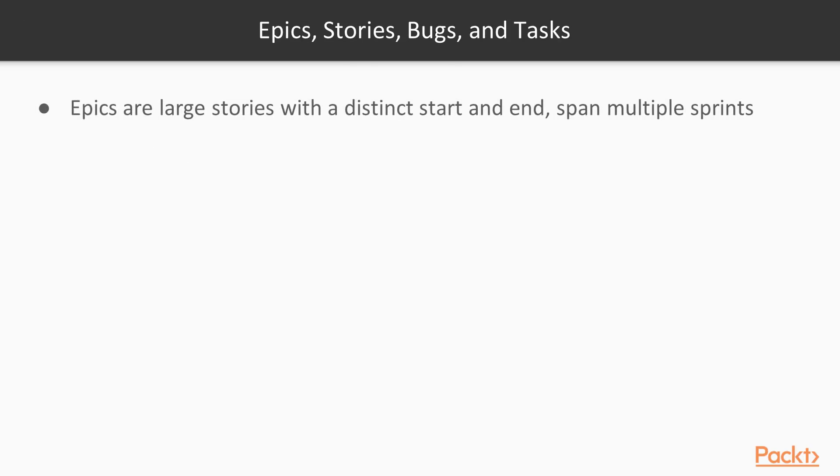So first, we'll talk about epics. Epics, as you might imagine, are large stories. Now, it's important that they have a distinct start and end. Just like any story, we want them to be able to be completed. I like to think of epics as something that would span multiple sprints versus a story, which would really be completed within a sprint.